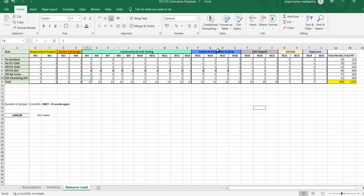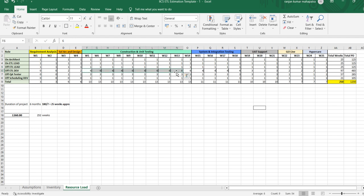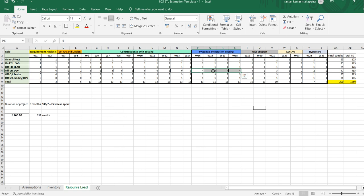Let's go to the SIT — system and integration testing — phase. During SIT, the on-site ETL architect and on-site ETL lead are still there. For the ETL developer, during the development phase I had six resources, but during SIT I am decreasing the number to four — meaning we are releasing two resources. Those four people will work on fixing any defects or bugs that come up during SIT. The three QA testers will continue in the SIT phase, and the scheduling developer will also be there.